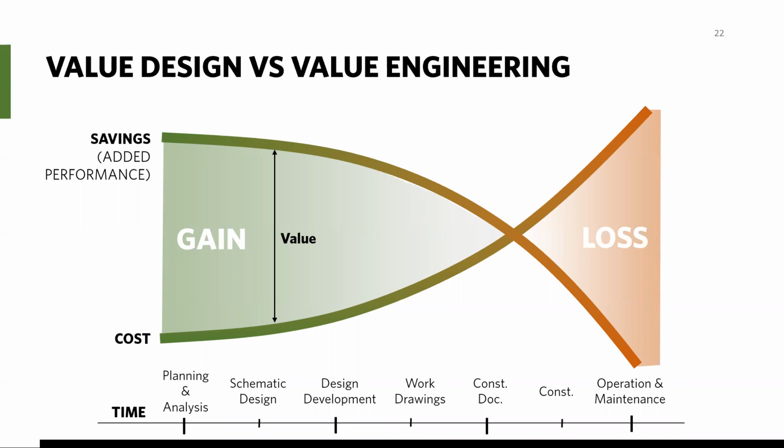Value design is not necessarily a substitute for value engineering. If there is a sudden change in the market or another situation, we may still need to value engineer to rectify it. And this value design really requires all the disciplines to work together at the planning stage to identify synergies between their solutions to add value. This is what we call integrated planning. The architects cannot do this alone.